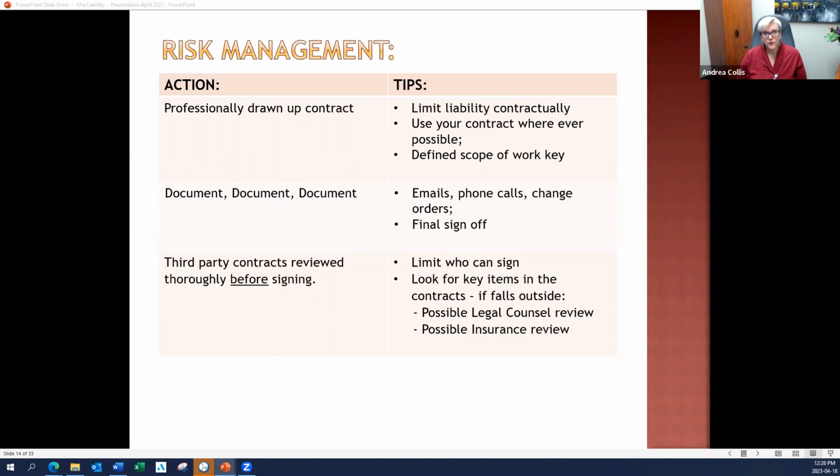And sometimes if we're not reviewing the clauses in those contracts, the changes can be thousands of dollars to comply with the insurance requirements. Or worse, if your particular insurer won't agree to the terms of the insurance terms in that contract, that can suddenly force you to remarket your insurance on a rush. Your premiums might go up substantially. So generally, I recommend a more proactive response of looking at the insurance provisions specifically before you sign a contract to know if you can negotiate those things.